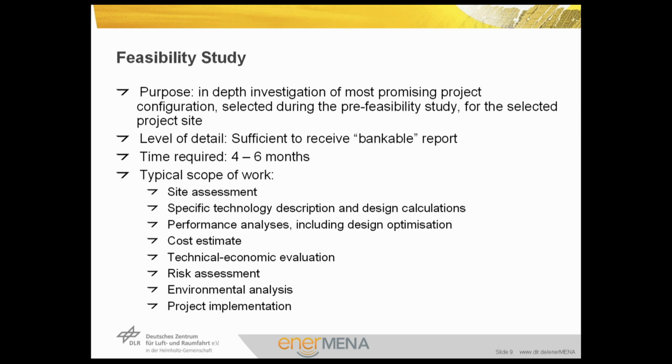Again, it is a general statement. It could be also shorter or longer. This depends also on the level of details in the pre-feasibility study. Moreover, you could overlap other studies in this duration, for example, the conceptual design study, to gain time and ensure a smooth project development.